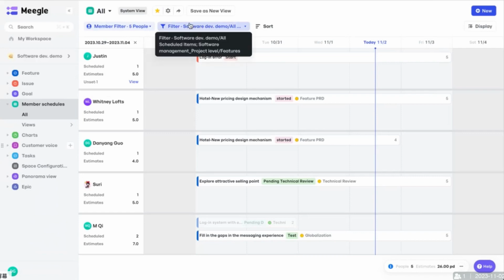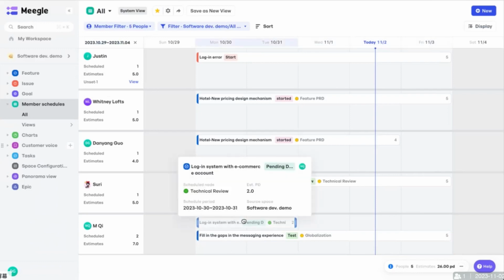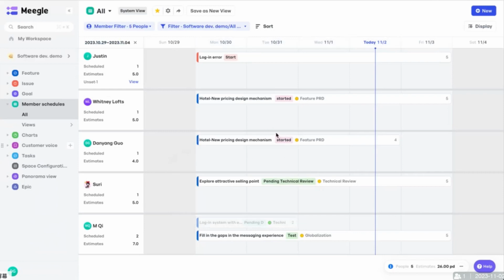So you can see here, if I select my team members and then select which work item I should consider and put those members together, I can see that in this specific week, for this colleague, her time is already overloaded, there are already more than 5 working days. But for this colleague, her working time hasn't exceeded 5 working days. So that means this workload allocation is imbalanced.